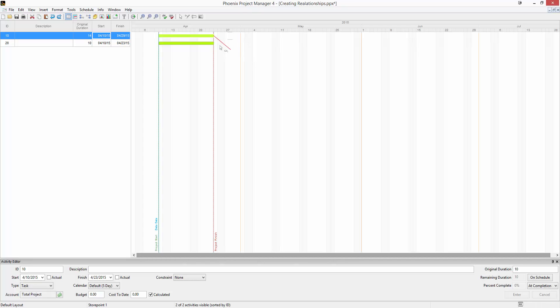If I mouse over the beginning of another activity, the dotted red line turns to green, letting me know that it's okay to drop, and the cursor changes to show me I'm creating a finish to start relationship. Once I let go of the mouse button, the relationship is created.